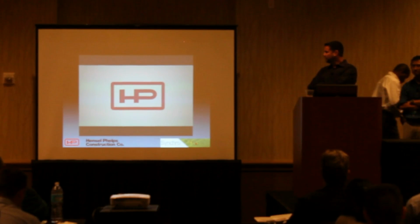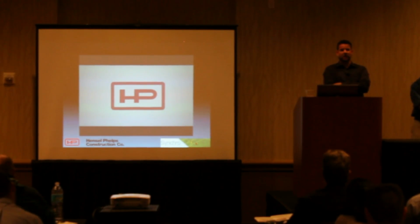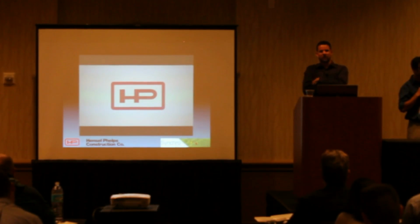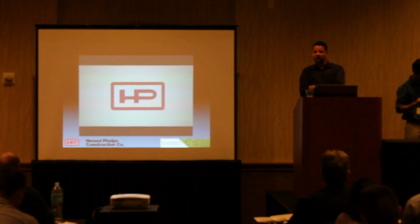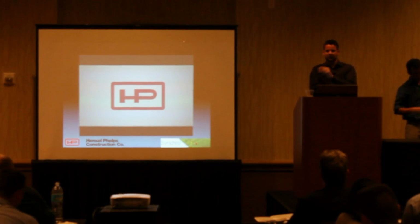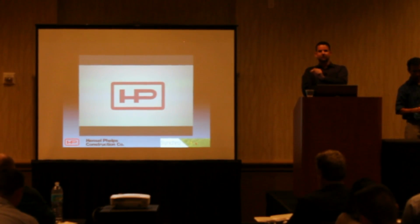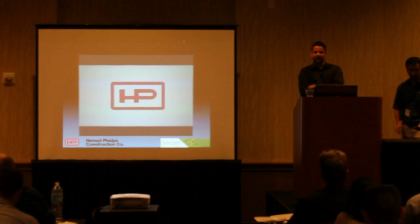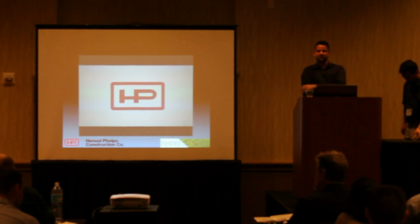Yes, I had probably 25 or 30 separate models, because each trade was a different model by floor. So probably 20 or 30 models wound up being brought into that. I wouldn't link everything. I would go through and grab that no-hub coupling, highlight all of them and delete every one of them. So either have your modeler do it in the background, or you can do it with Synchro. You've got a couple different options.